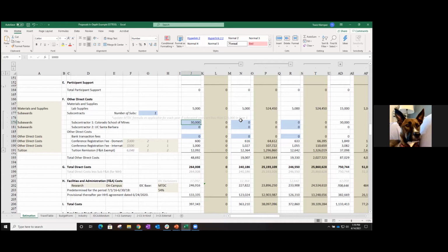If you have less than $25,000 in costs, that'll affect the calculation. So let's say you do have 15,000 in year 1 and 15,000 in year 2. So you meet that 25,000 threshold somewhere in year 2. So we have to manually adjust the formula for year 1 and for year 2 here.